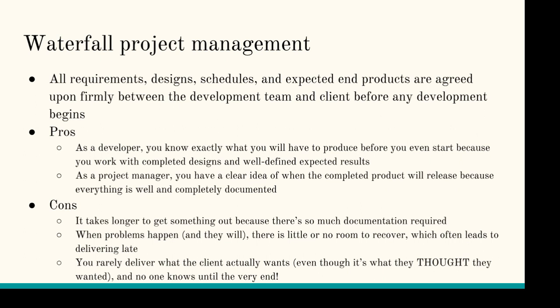So in waterfall, all the requirements, the designs, the schedules, and the expected end products are agreed upon firmly between the development team and the client before any development begins. Before we write a single line of code, we map out exactly when it's going to be delivered and exactly what we're going to deliver.